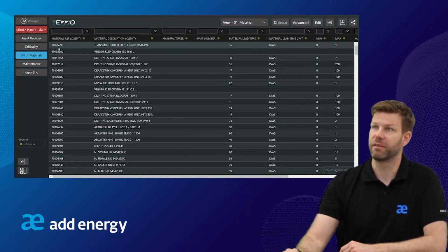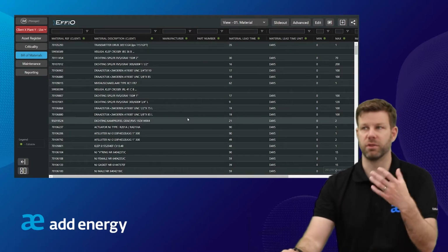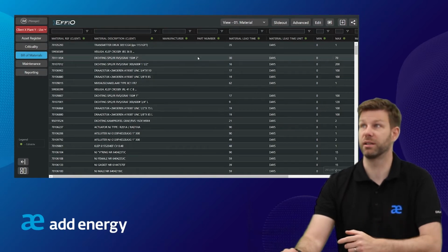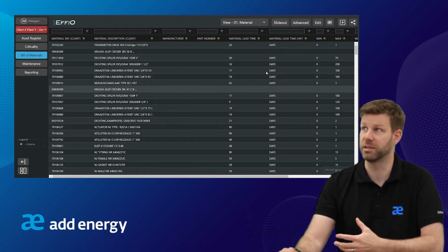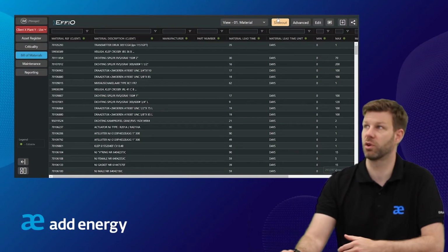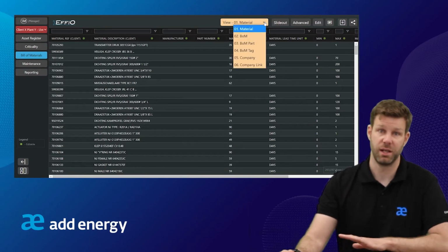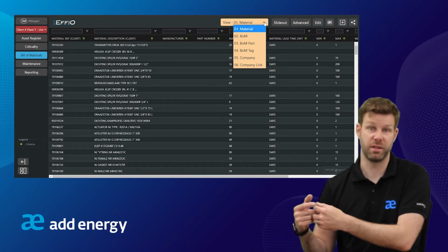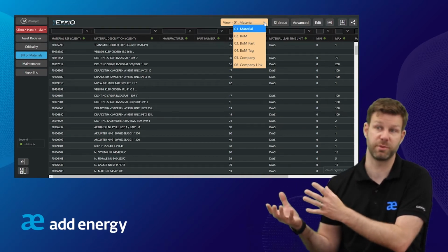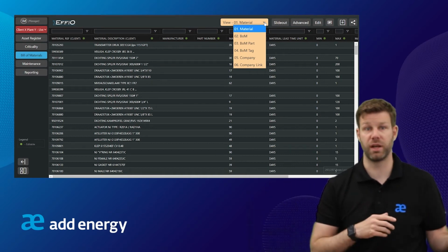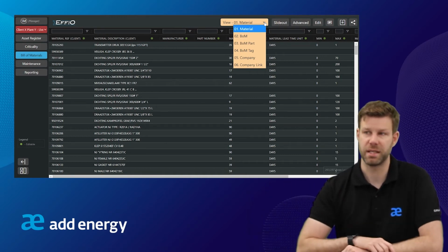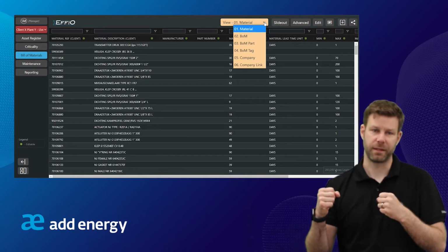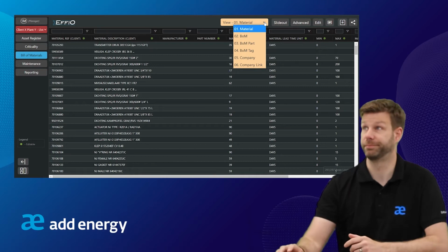So in this section here we have a list of all the materials. So again, large amounts of things. We can look in here about the description for it as well, the manufacturer, the part number. We'll look at the material lead time, min-max levels of stock. We can hold all that information inside this. So if you already have that information residing somewhere, whether it's in the CMS or in your material management database, you can pull that information in and see it and start to make connections. So again, this is a tool for trying to understand your information and improve it and enrich it.